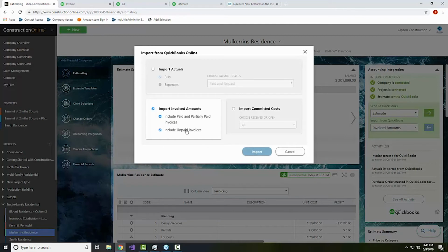Now, this one's going to be an important one too, because again, if you have set up all of the invoices ahead of time, you probably don't want to include all unpaid invoices because then it would just look like you've collected for 100%. So if you're planning ahead, make sure that you only check the option to get the paid invoices so that you can see the money you've actually collected. Or if you want to see what's left, maybe instead of using the paid option, we'll go with just unpaid invoices. Again, my goal in this case would be to see all the invoices that I've sent to my customer that they haven't paid for yet, to give me an idea what dollar amount needs to be in the email that I'm about to draft up and send to them saying they need to pay me.